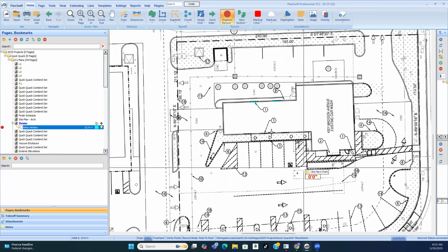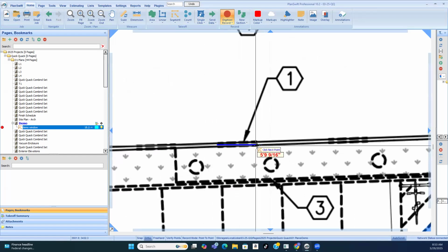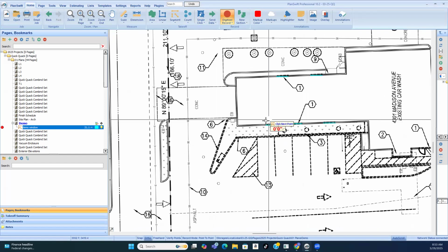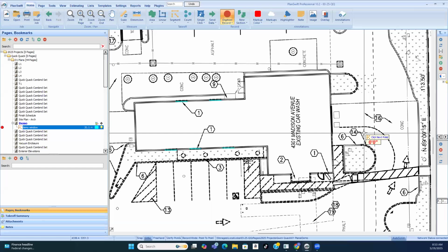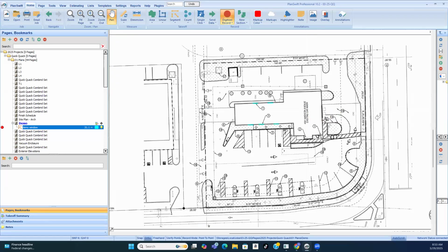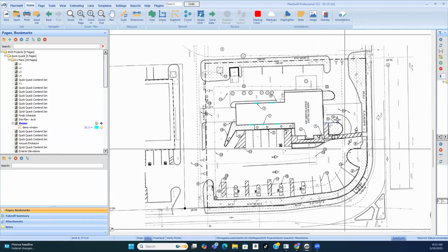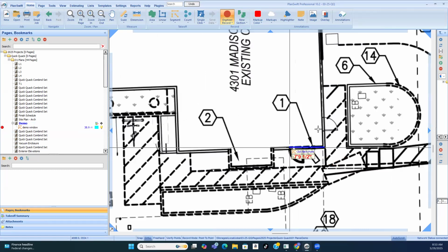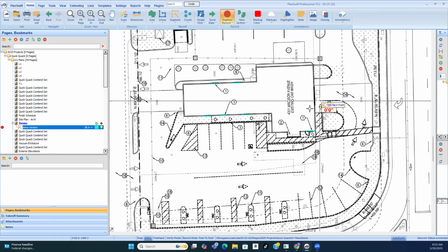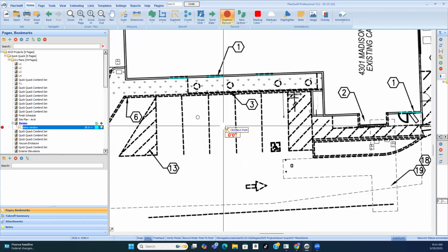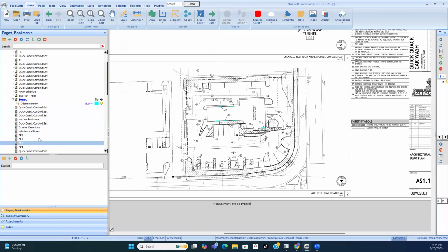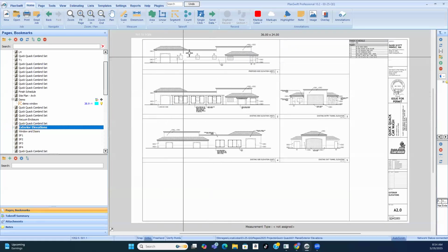Every time we see that one, here's one here. Square feet is length times width. They're not giving us the width of this window at all. So you either guess, or what I would try to do, because I don't really know what they're doing with that window, is look at the exterior elevations.